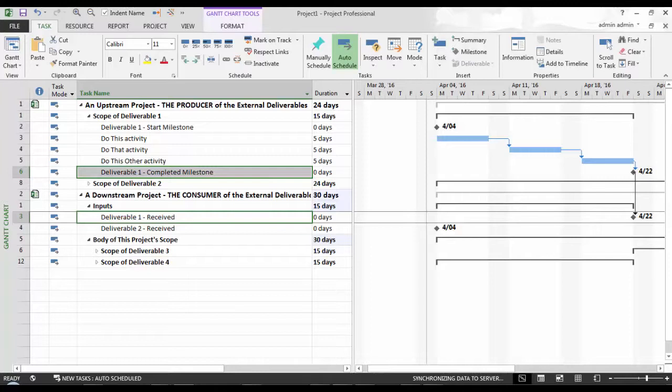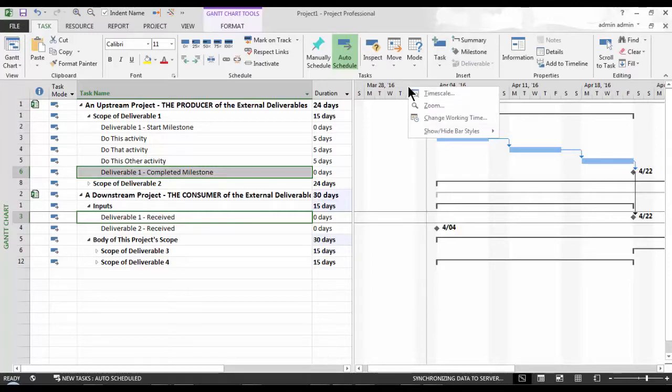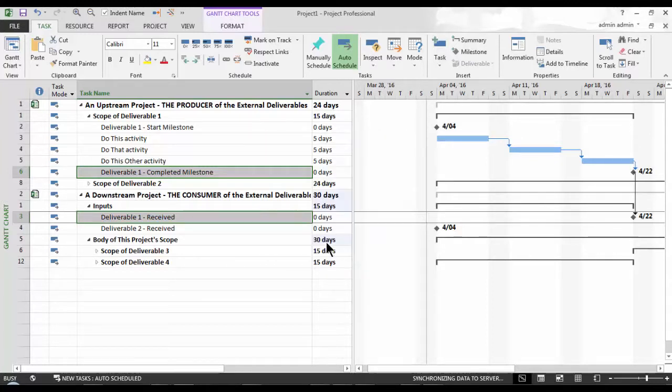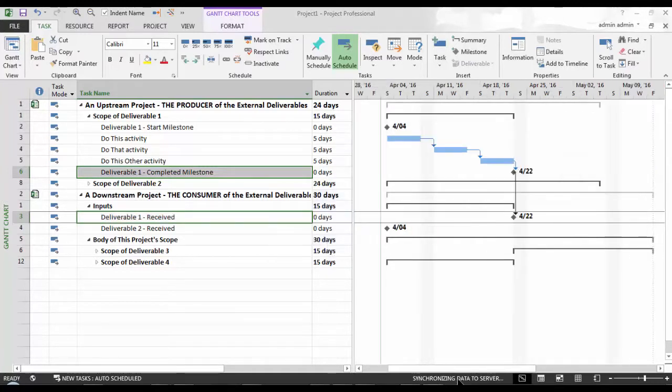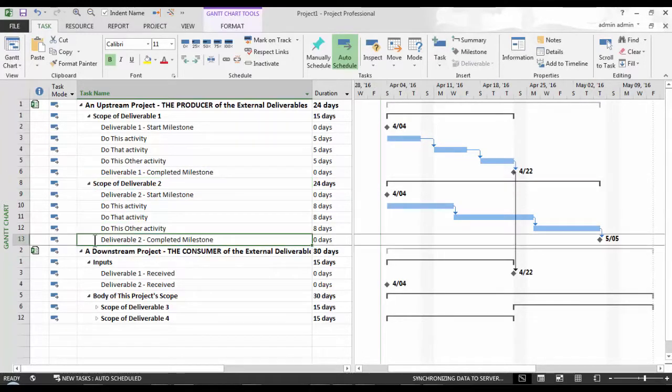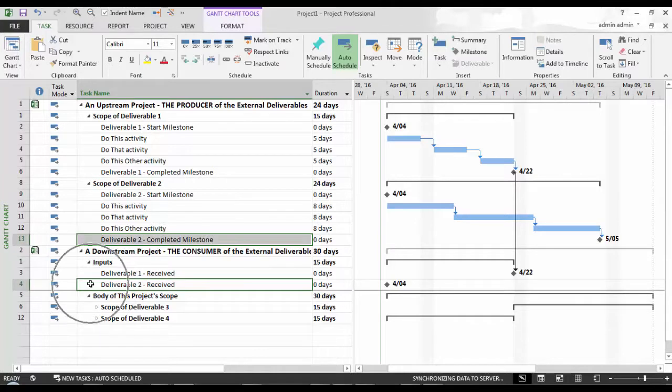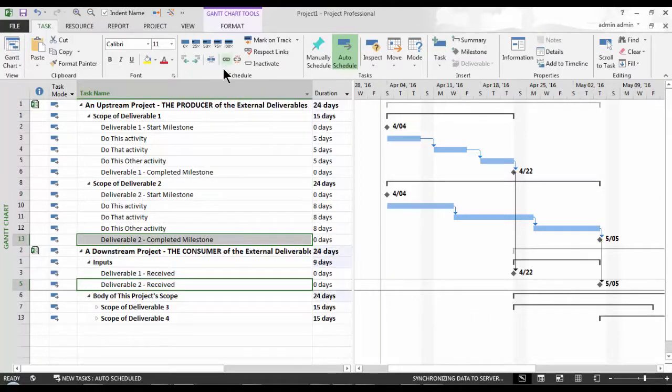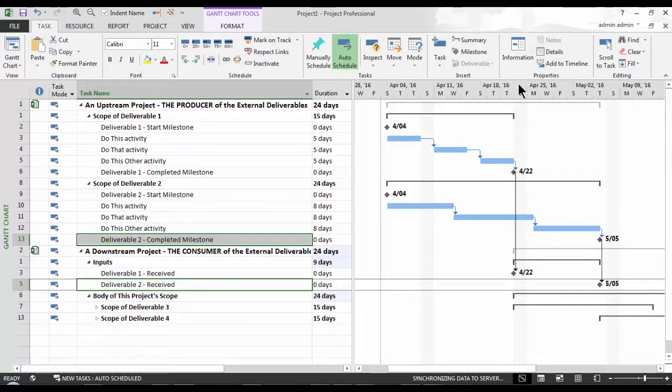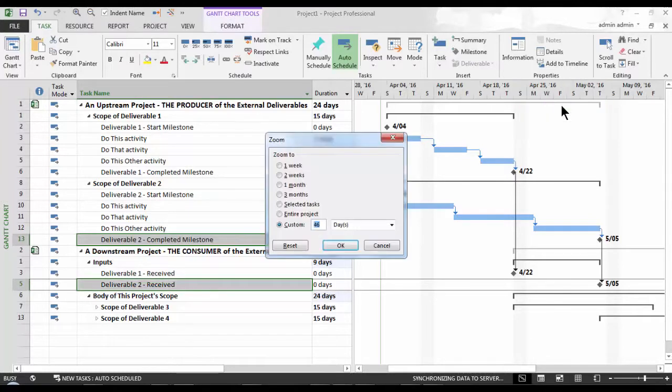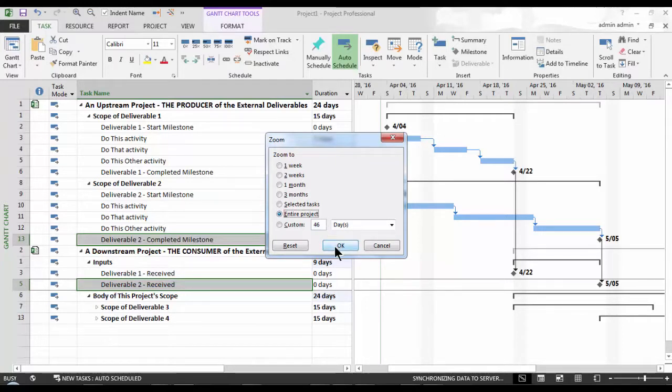I've set a similar dependency between Deliverable 2 received that's driving the Scope of Deliverable 4. Note, when details are collapsed, dependency lines do not display. I will expand the details of Scope of Deliverable 3 and 4 in a moment to reveal the lines linking these tasks. In the meantime, allow me to zoom out to see the entire Gantt details from the beginning to end. Let's go ahead and select our other driver task, the Deliverable 2 received, and link it to our downstream's Deliverable 2 received milestone.